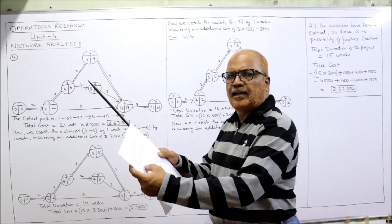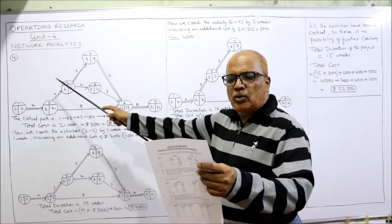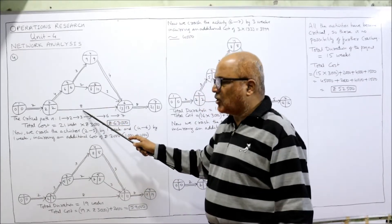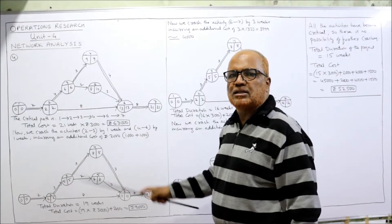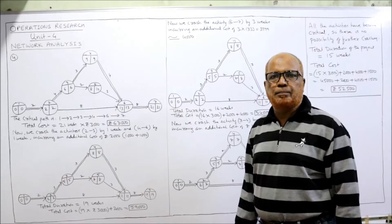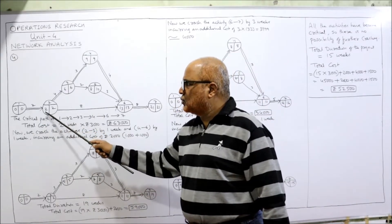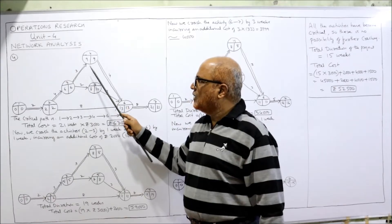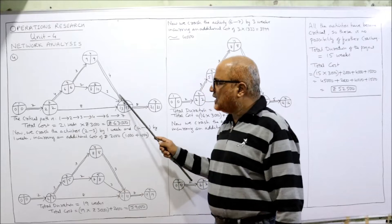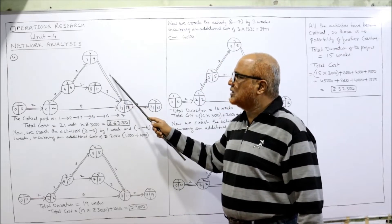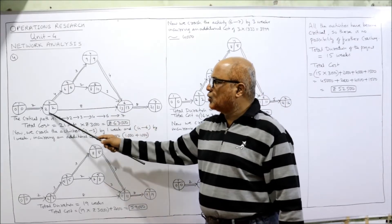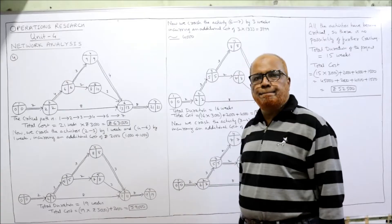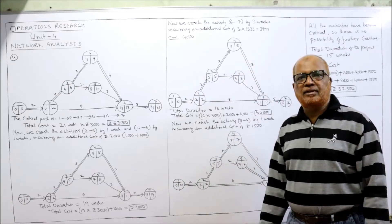Now write the normal times on each activity: 1→2 is 2, 2→3 is 4, 2→6 is 8, 3→4 is 3, 3→5 is 2, 4→6 is 4, 5→6 is 3, 6→7 is 8. For the forward pass EST: 0+2=2, 2+4=6, 6+3=9, 6+2=8. At node 6, three arrows merge — take the maximum: 9+4=13, 8+3=11, 2+8=10 — the highest is 13. Then 13+8=21. Forward pass complete.